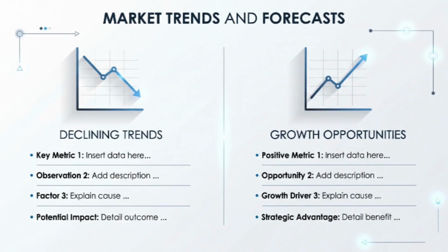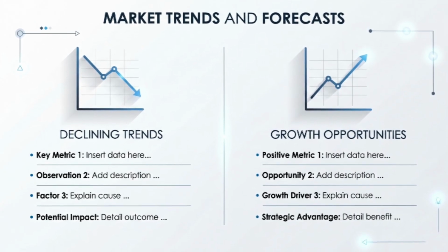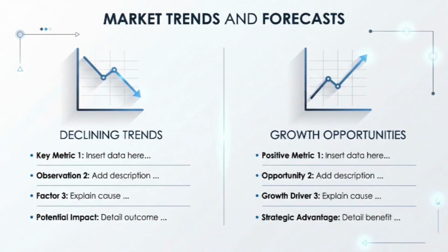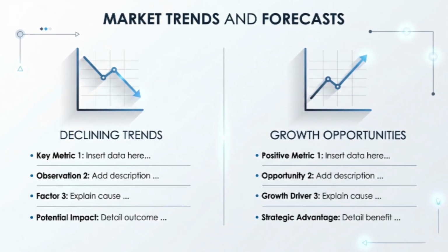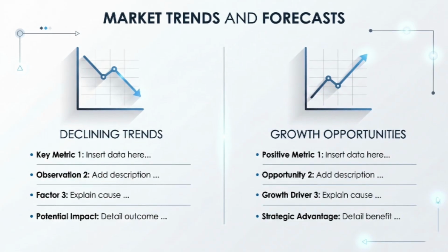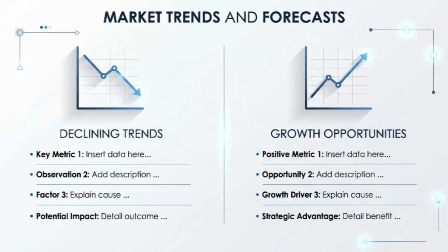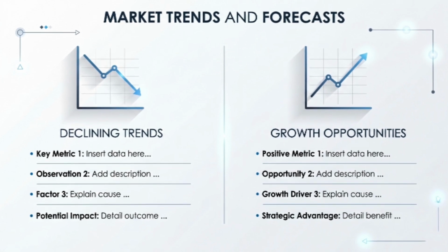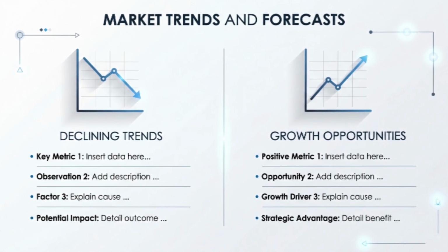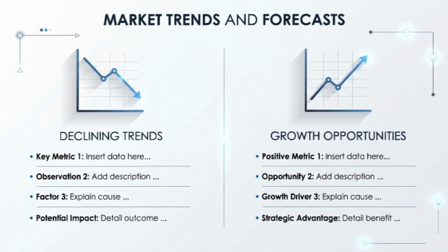So, which one should you use? It comes down to who you are communicating with and the nature of your project. Use a burndown chart for your internal development during a strict short-term sprint. It provides a sharp psychological focus on the immediate finish line. It tells the team, here is what is left. Let's get to 0. Use a burnup chart for long-term projects, external clients, or executive stakeholders.